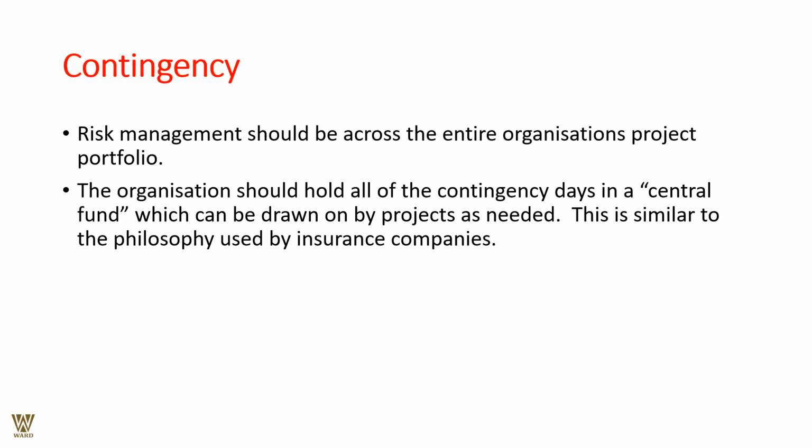Risk management should be across the entire organization's project portfolio. The organization should hold all contingency days in a central fund, which can be drawn on by projects as and when required. This is similar to the philosophy used by insurance companies.